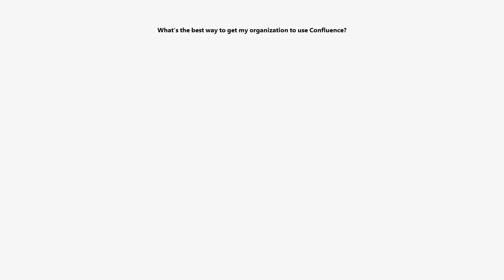And then you can also use Confluence for reporting out results and end of project wrap-up blogs. So I just did an end of project wrap-up blog last week. So this is just a quarter after your project ends, reporting on the results you got and sharing with the team. And that's a really nice way to sort of close out a project.